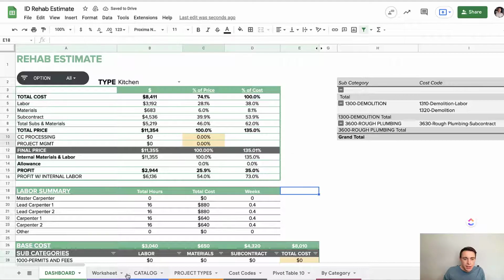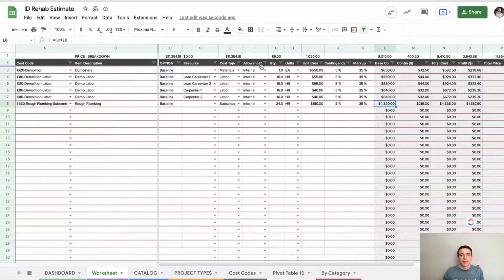Now, the other thing I want to talk about is allowance, okay? So in my business with residential remodeling, I give my customers an allowance for selection. So for kitchen cabinetry, for plumbing fixtures, for electrical fixtures, they're getting allowances. And I'm adding this to their total price, but I am separating it out and I'm giving them this list and I'm saying, here's the stuff that's included in your price, but this is the number I got on it. If you spend more, if you spend less, you're gonna get that marginal benefit or the marginal extra cost. So it is fun for me to be able to separate that out.